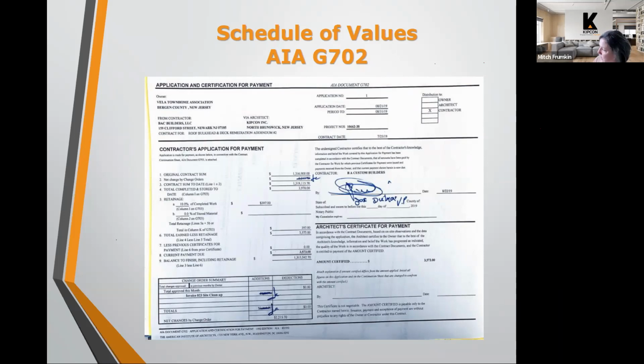It could be an invoice monthly, an invoice for 50% of the project, or an invoice when all work is complete if the project moves fairly quickly. This AIA document uses that original bid that was in the bid package, breaks down the contract sums, and then compares them.